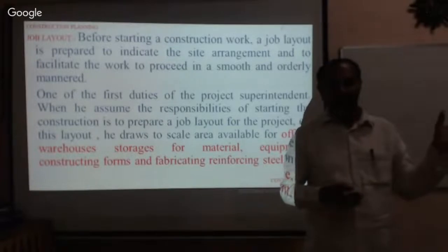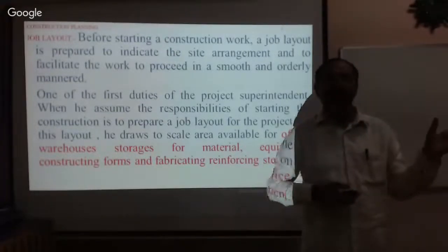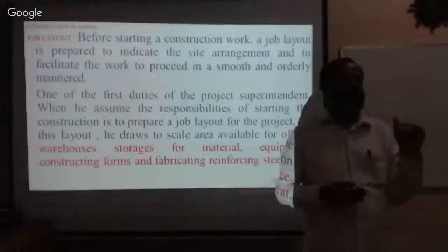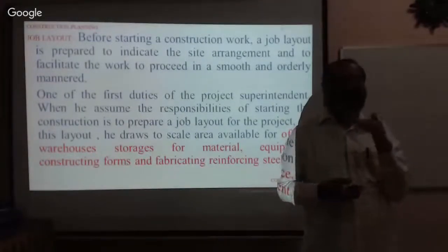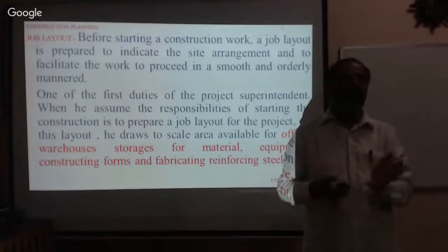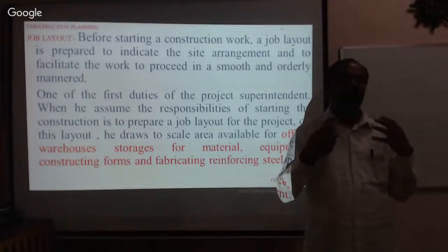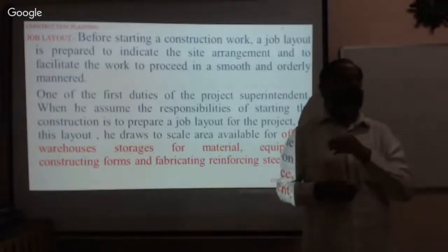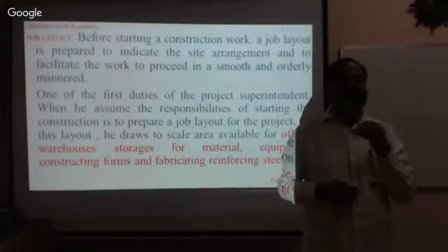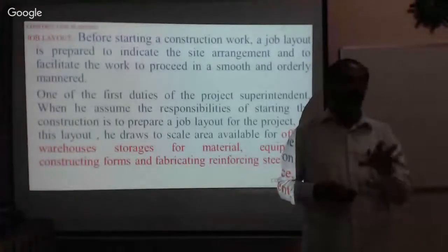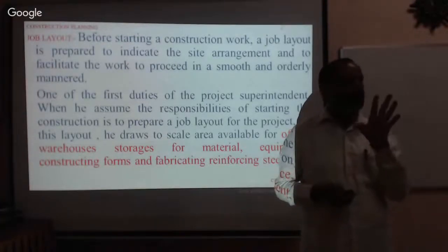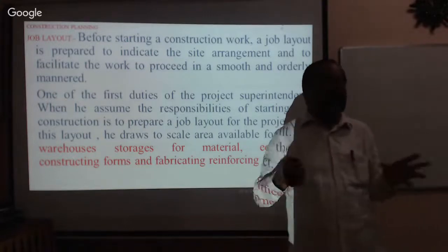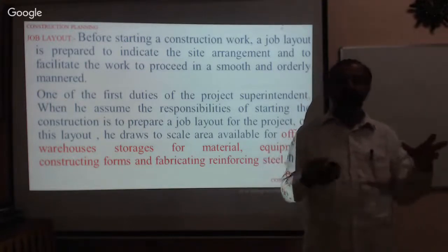It's a super dam. They commenced in the late 1970s and finished in the middle of the 1980s. They established a village called Ganeshagudi. In Ganeshagudi, they established the machine plant, schools, colleges, hospital, houses, and buildings for residents, for engineers, for workers, all types of people, isn't it? So that is job layout.